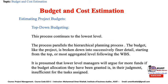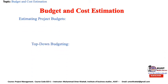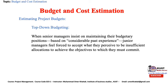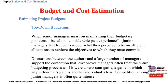It is presumed that lower-level managers will argue for more funds if the budget allocation is in their judgment insufficient. When senior managers insist on maintaining their budgetary positions based on their considerable past experience, junior managers feel forced to accept what they perceive as insufficient allocation. Lower-level managers often treat the entire budgeting process as a zero-sum game — a game in which any individual's gain is another's loss. Competition among junior managers is often quite intense. The advantage of this top-down process is that aggregate budgets can often be developed quite accurately, with budget categories stable as a percent of the total, making for higher predictability.